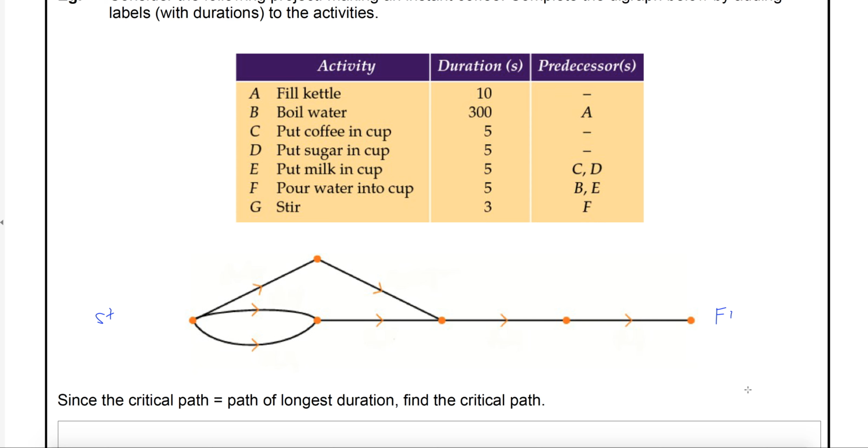Excellent. They've got no predecessors. There's that little dash on the predecessor table. So if I maybe start from the end instead, and then I can start to piece it together, what might go to the finish? What might be the last activity that is completed? G. Good. So I'm going to label that as G. And of course, we put the duration on as well, so comma 3.